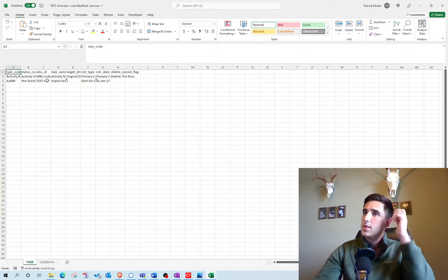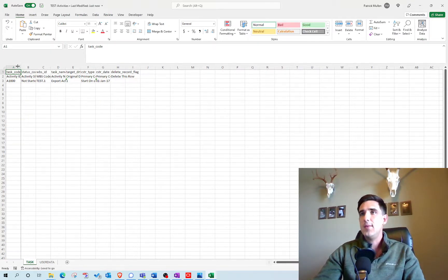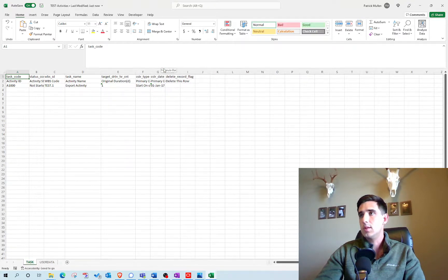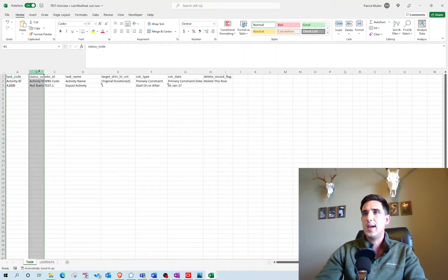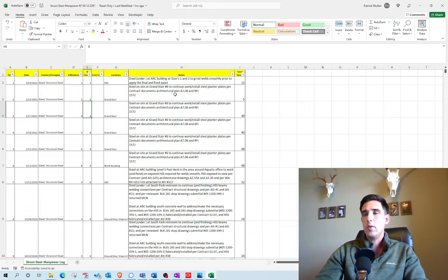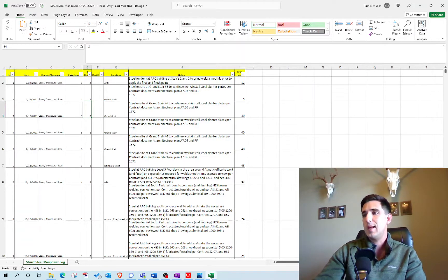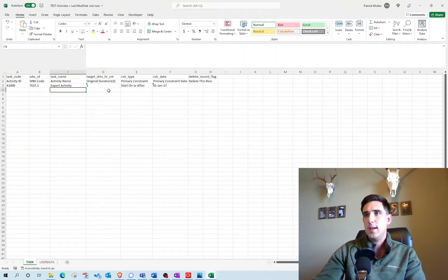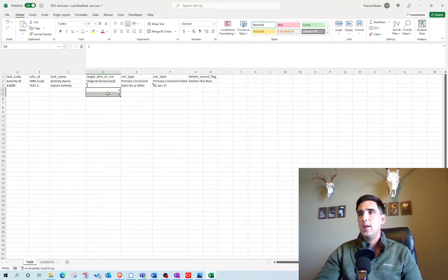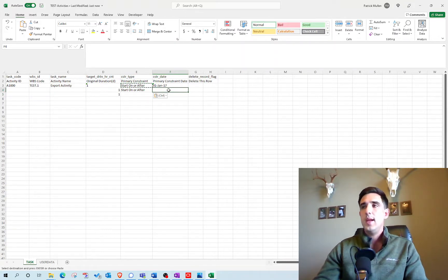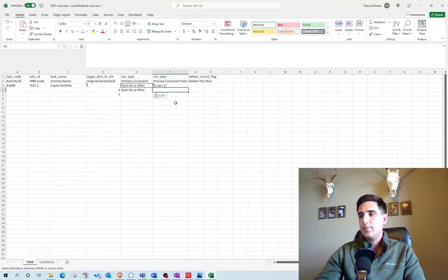That export was successful. I opened the file and here it is. The only information I need is Activity ID, WBS code, Name, Duration, and those constraints. I'm expanding those so you can see them a bit better. I don't need the Activity Status — that's not relevant, so I'll delete that. Now I need to get the structural steel daily report information into the same format and copy it over to this template. I need an Activity ID, correct WBS code, a name, a one-day duration, and a start on or after primary constraint assigned to whatever day that individual activity occurred.